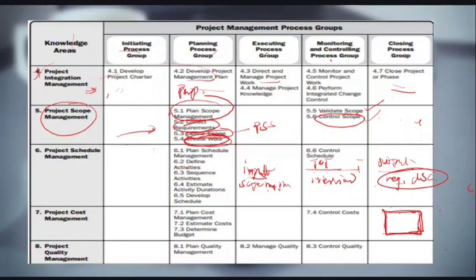Now, a person thinks we could do F. Where did that F come from? Was it something from the customer? Probably was from the customer. Customer says, now I want you to add F. So this is a change. What happens? It goes to the CCB. Customer is asking for F to be done. Now CCB will check, is it something that we can do?